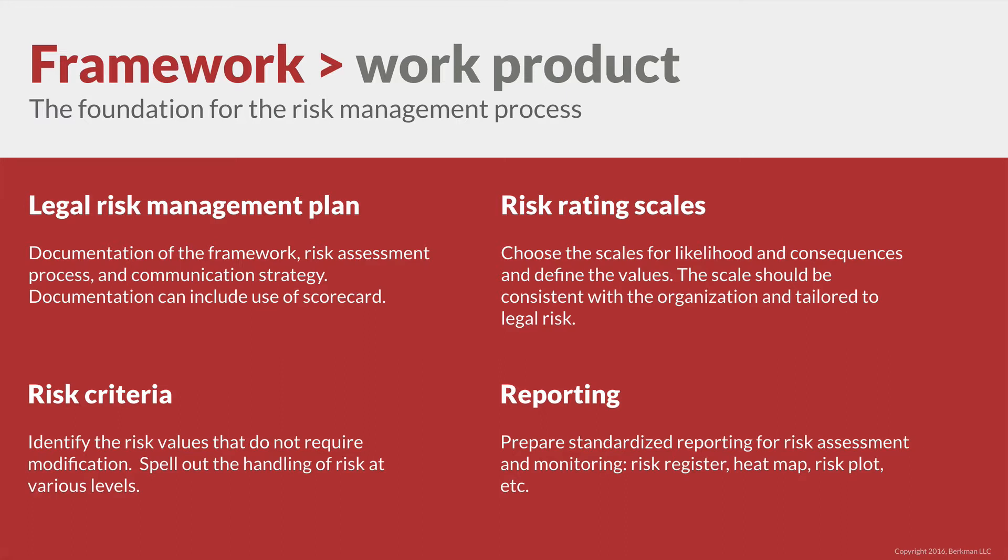One, draft the legal risk management plan. Two, establish our risk criteria. Three, create our risk rating scales. And four, begin to outline our reporting.